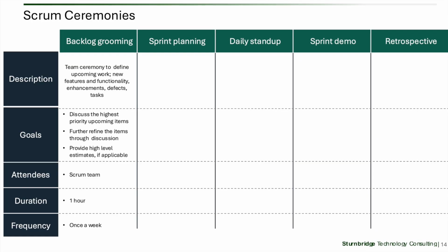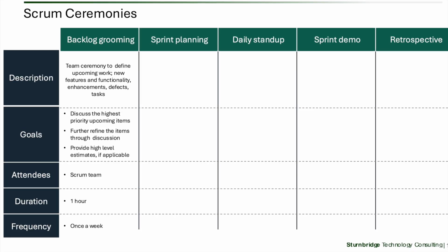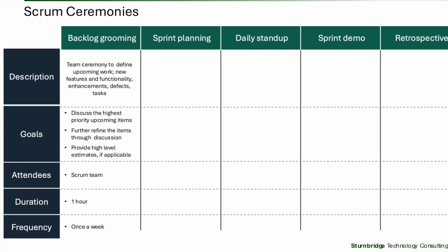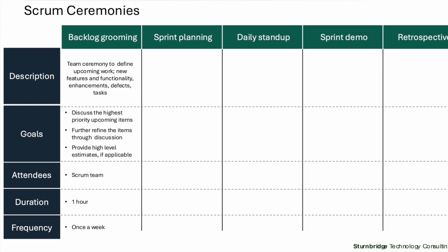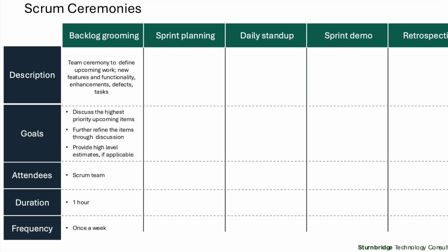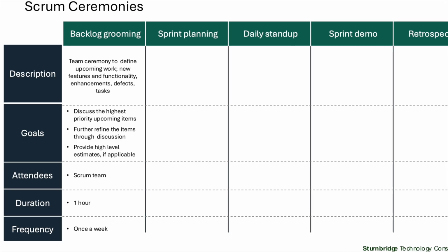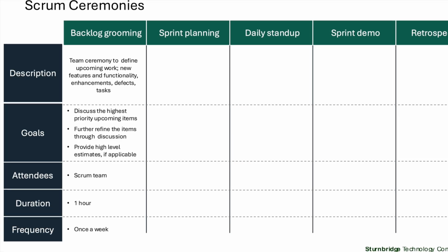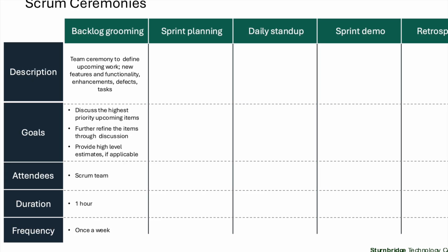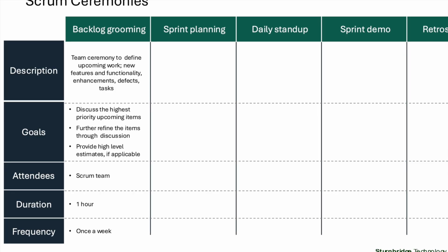During the backlog grooming call, the product owner usually outlines the item, and the team then discusses to further refine. This is where the team should ask questions, provide any additional ideas, thoughts, or raise any concerns with the feature. It is intended to be an open discussion where the team can discuss and review the upcoming item with the goal to define it as much as possible ahead of the next sprint. If time permitting, it is also best practice to try to have the item estimated during the backlog grooming process.